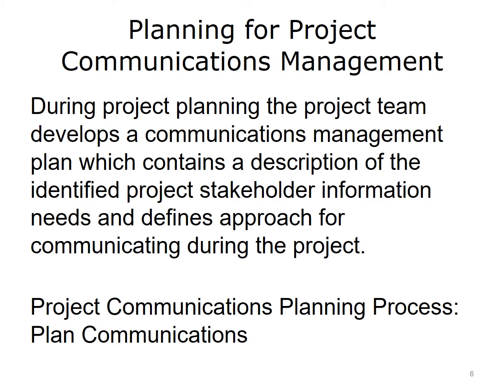During project planning, the project team develops a communication management plan, which contains a description of the identified project stakeholder information needs and defines approaches for communicating during the project. A communication requirements analysis is performed to determine the stakeholder information needs. Project team must determine what project information will be shared, who it will be shared with, when the information will be shared, and how the information will be shared.